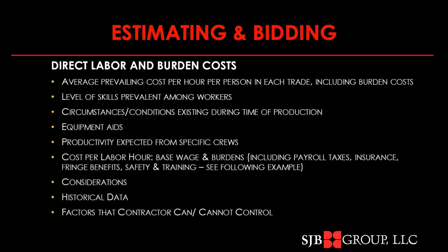For direct labor and burden costs, under the level of skills and the pay rates that you're evaluating, you need to be aware of a lot of jobs that have significant federal funds behind them. There may be a prescribed wage scale in the contract. And in certain venues, you may have to evaluate using union scale.